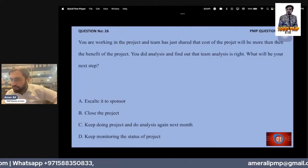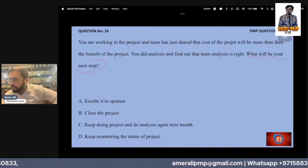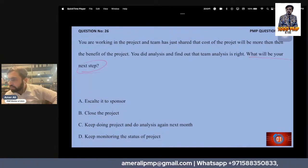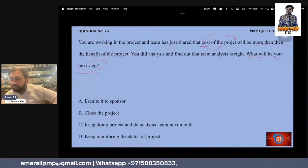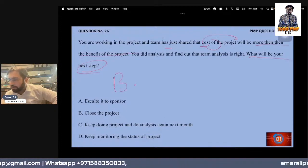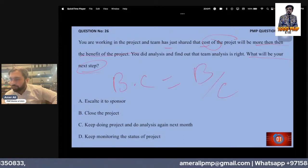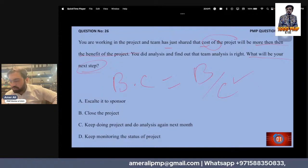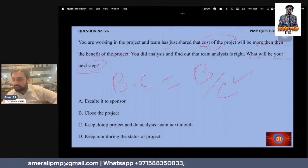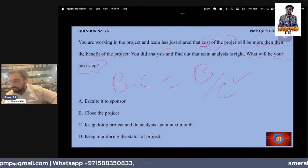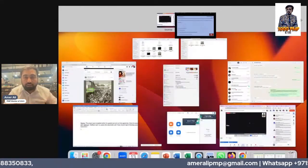What will be your next step? You are working in a project and your team has just shared that the cost will be more than the benefit. We know that a business case stands on benefit-to-cost ratio, but now the cost is more. What will you do? You can keep monitoring, but your responsibility as a project manager is to escalate. That is the first step.